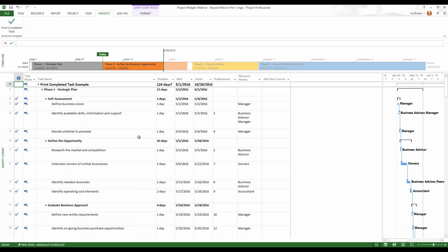Well, oftentimes an organization uses templates, and they build those templates for the different types of projects that they work on, and they put the standard work breakdown structure within those templates, and they even sometimes assign generic resources to the tasks within that template. And when you assign those generic resources, you're then often going to estimate how much work it typically takes to perform that task. And that's what you're going to put in as the work value.